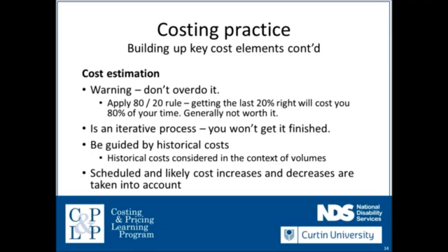Remember too, it's an iterative process. You'll never finish costing and pricing. You go around in circles, costing and pricing and refining all the time, and re-undertaking, re-costing and repricing depending on changes in the way funding is undertaken, changes in the way you might recognise units of measurement, and changes in activity and other levels that you might not have thought about when you first launched your costing and pricing program. So therefore you need to recognise that this is an iterative process and you need to be continually checking your figures in relation to what your expectations were compared to the actual outcome.